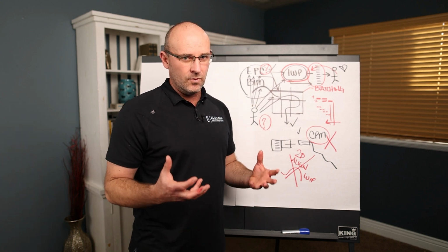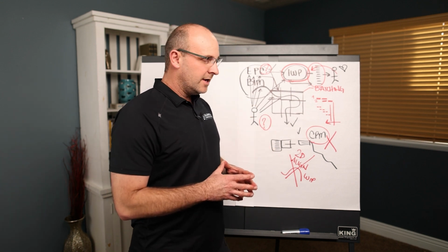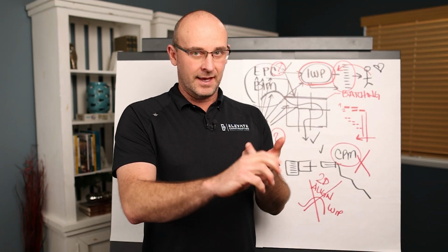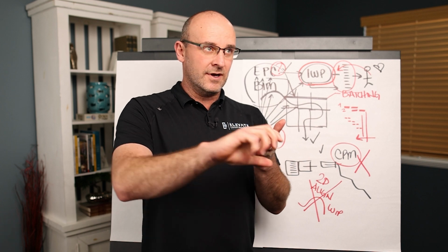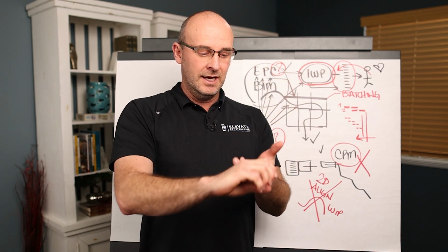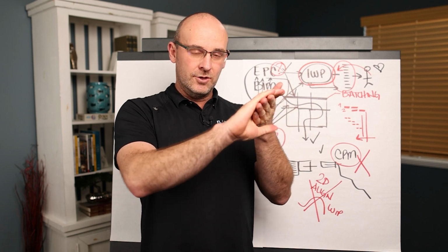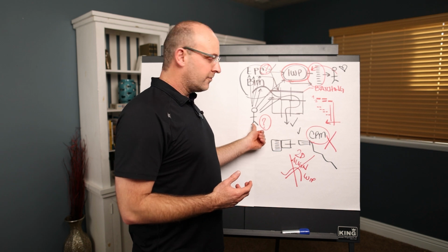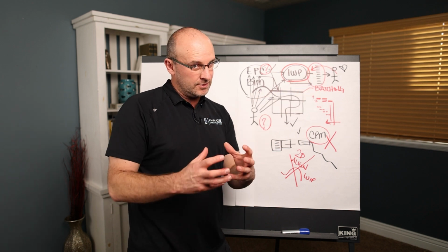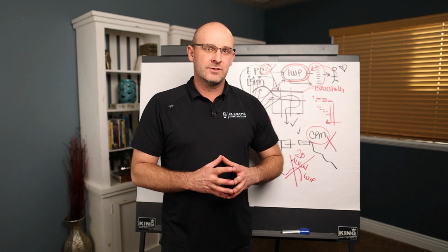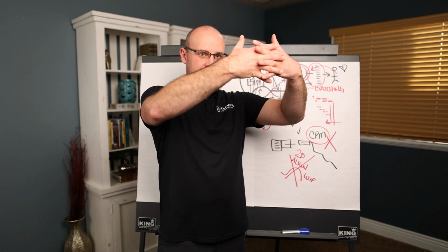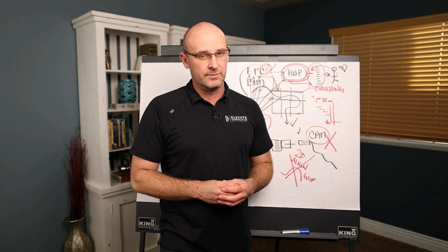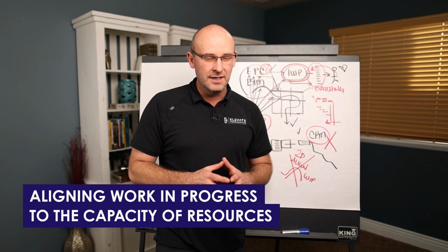And so if you really look at what the intent was behind advanced work packaging, it is literally breaking up the work into work areas and then work packages, then identifying the priority based on a path of construction, utilizing building information modeling, utilizing advanced planning methods, which I absolutely love, having WorkFace planners prepare the work for the foreman, which we need to adjust there, and really making sure that we have not only aligned the supply chains, but we have a good production flow on the project site, and that we're controlling, or my preferred word would be aligning work in progress to the capacity of resources.